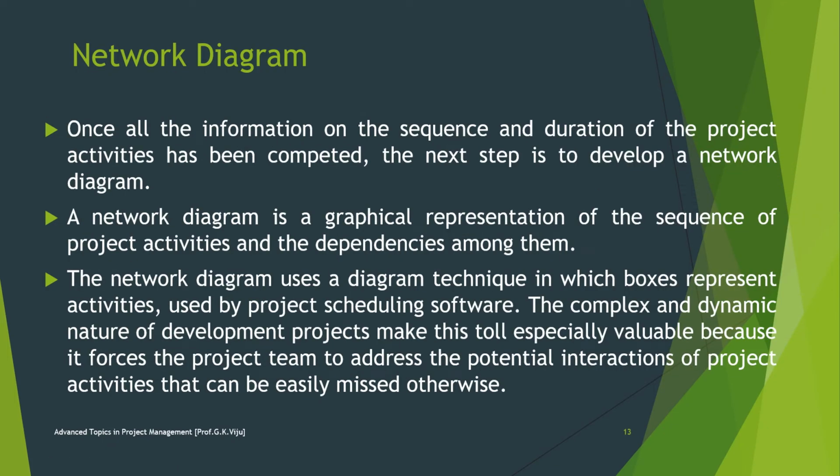Then come the network diagrams, or precedence diagrams. The precedence diagram is a tool for scheduling activities in a project plan. It's a method of constructing a project schedule network diagram that uses boxes, referred to as nodes, to represent activities and connects them with arrows that show the dependencies. This method is likewise called activity on node.